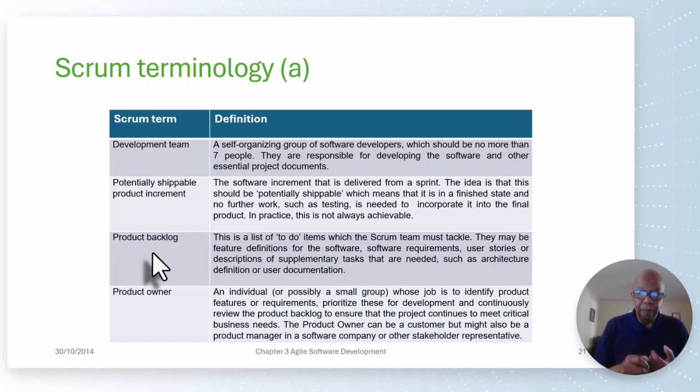So the product backlog basically has everything that I'm going to be doing for building an application. I do my planning and say, okay, I'm going to pull this out of the product backlog, and this out of the product backlog, and I'm going to do that in sprint one. I put that into the sprint backlog and do some planning. What out of the sprint backlog can I do in the 2 to 4 weeks?